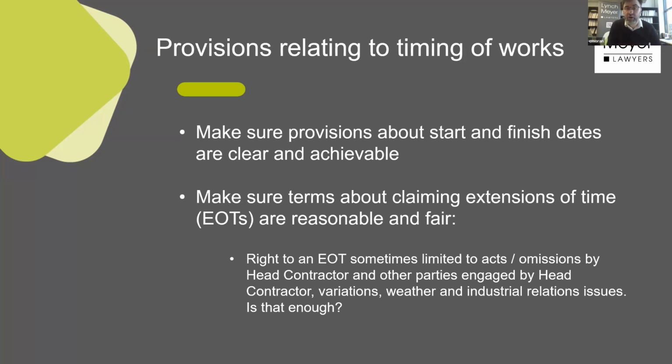And even if there aren't LDs in a contract, that doesn't mean you don't have to pay delay damages if you delay the works. It just means that you revert back to the person who engaged you to actually prove their loss, which can sometimes be a difficult thing, which is why LDs are preferred by people who are engaging parties, because it locks in a particular figure. But that's why we're focusing so much on this, because I'm trying to reduce the risk that at the end of jobs, contractors are lumped with it, and it happens.